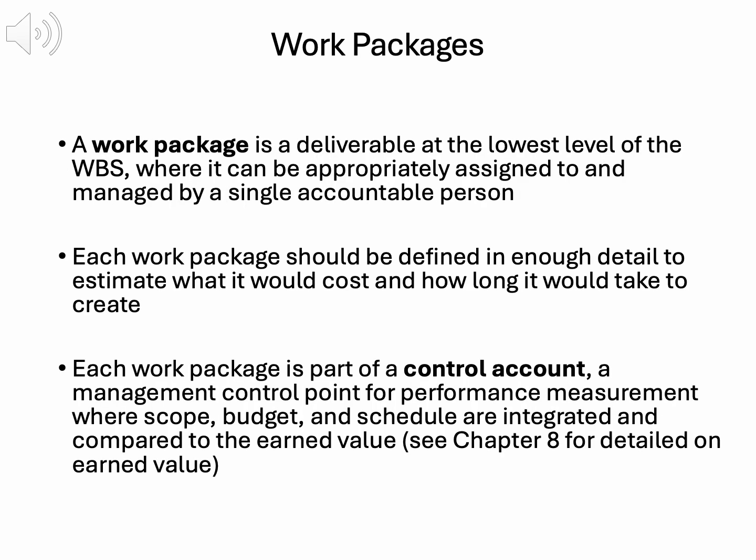Let's explore work packages, the building blocks of the work breakdown structure, WBS. This slide explains their role in defining project scope and ensuring manageable deliverables. A work package is a deliverable at the lowest level of the WBS, assigned to a single accountable person. It's defined with enough detail to estimate cost and duration, making it a manageable unit of work. For the just-in-time training project, the survey administration work package involves sending a survey, with clear tasks and resources, as seen in the WBS dictionary.